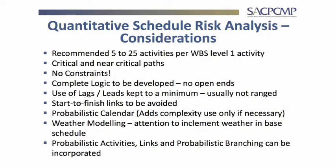For quantitative schedule risk, we import the program — say 5,000 line activities, all with activity numbers. We take the risk register and identify where in the schedule to link each risk. For example, motorized valves being late: we only link them to the four areas where they're being installed. We recommend never linking more than 25 activities in a schedule to one risk.